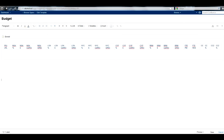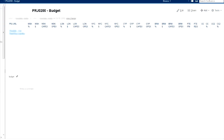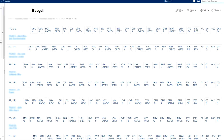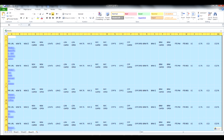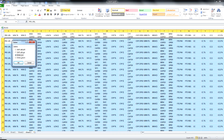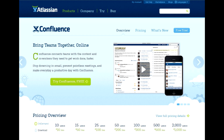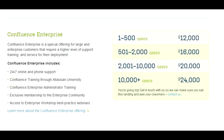One more report worth showing is not for management but for accounting. Create a budget template with a single excerpt containing a one-row table with a project link and all the fields required by your finance department. Use this template to add a budget page to all your projects. Then create another page filled with excerpt include macros pulling excerpts from all those budget pages. Select all the data and paste it to Excel. Sort the data alphabetically to remove repetitive cell titles, and you've got a budget table with all your projects' financials in a single Excel spreadsheet for your accounting department to use for budget planning. And while they do that, politely ask them if your organization could invest in a less outdated project management tool.